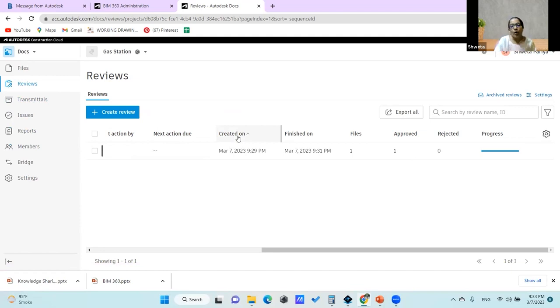So rather than all of this information being in different modes, keep everything in one consolidated environment. So at any point of time, if I want to see, okay, I've put 100 stores for review, only 20 are approved, 30 are rejected, 30 are still pending for review, I will have a count, I will have a track of things. Other members of the project will also have a track of things, that one store is approved, second store is approved. So we all are on the same page. We all have the same information. The loss of information becomes bare minimum here.